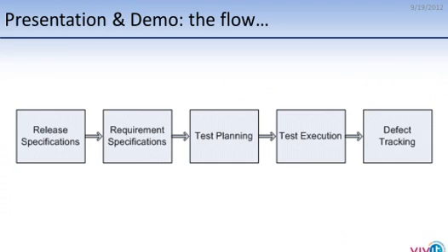We have to do work in there, specify the releases and the cycles, followed by capturing and extracting requirements, which is the second block in here, requirement specifications, followed by creating test cases in the test plan, which is, as the name indicates, test planning, after which we take the requirements or the test cases from the test plan into the test lab in order to be executed.